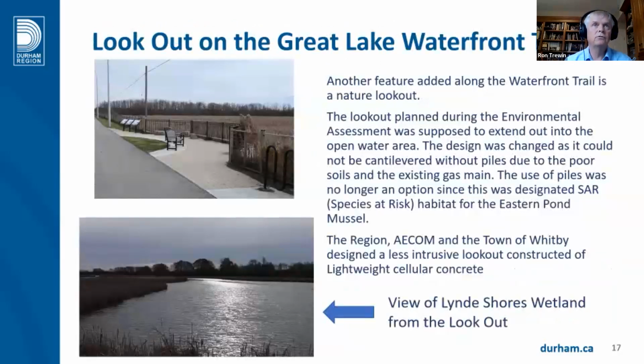Another feature added along the waterfront trail is a nature lookout. You've got all this waterfront trail, of course, we're going to have some kind of lookout, some kind of feature. Originally planned during the environmental assessment, this was supposed to extend out into the open water. The design was changed. It could not be cantilevered without piles due to the poor soils and the existing gas main. The gas main was approximately in this location.